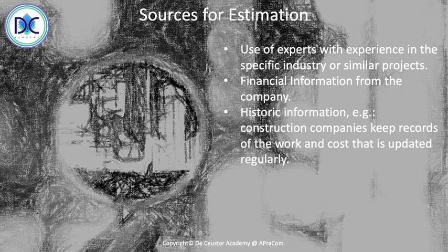The Delphi method is a very interesting method where people come together, they give some estimations, and people discuss. They look at the lowest estimate, the highest estimate. People explain how they determined that value, and then they do another round of estimation. You can find a lot of methods for how to use the Delphi method.